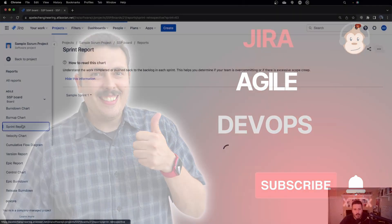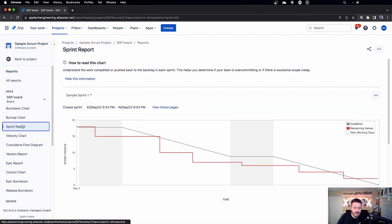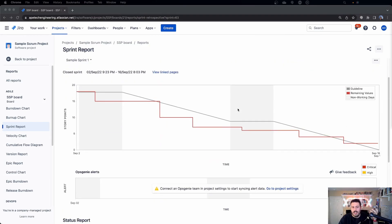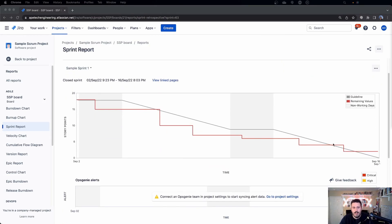Let's jump into Jira. Now, the Sprint Report is interesting. It's not the best, and it's basically a copy of the burndown, but it's most valuable at the end when you complete your sprint. What this one does is it gives you a summary of your burndown.